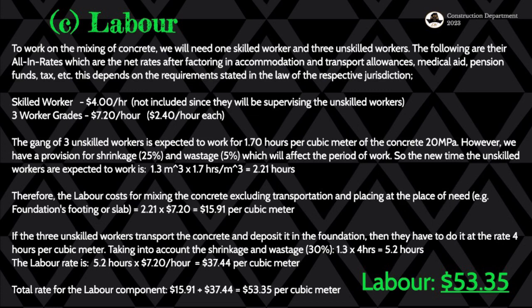The following are their all-in rates, which are the net rates after factoring in accommodation, transport allowance, medical aid, pension funds, tax, etc. So all those costs that will be incurred as you employ these workers will be factored in, which you call the all-in rates. If they are not factored in, we'll do the same thing that we did with VAT just some minutes ago. So make sure you understand that point.